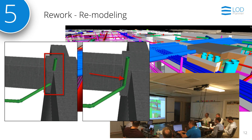The fifth waste is rework — when we do something for the second or third time onwards, it's just waste. Especially when it comes to clashes and coordination: any clash in a model is waste, because it means we have to do something again. Making sure the sequence of elements is correct and that we are sharing models helps us eliminate rework. We can see clashes being resolved as a good thing, but we could have possibly avoided them — for example, if the plumbing consultant had the structural models first, they could have avoided the clash entirely. It's much more efficient to avoid it in the first place.